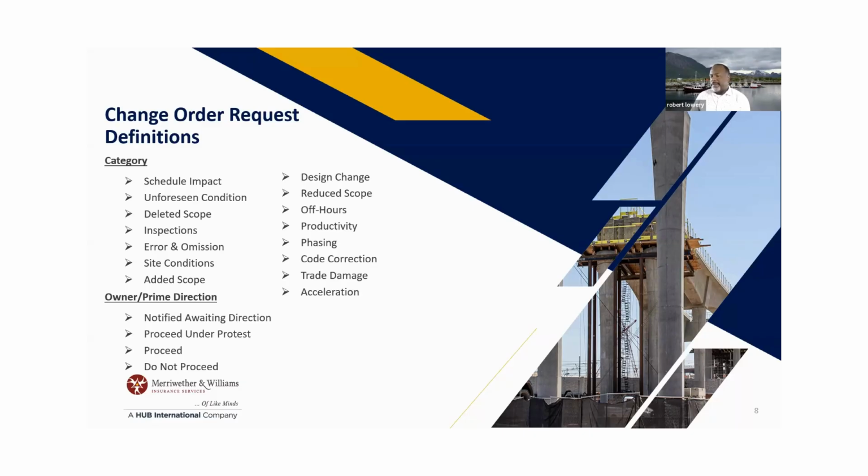Then they have 5 days, or whatever it says, to review and give those comments and approved shop drawing submittals back to you. At that point is when the clock starts to tick with your suppliers and manufacturers. Once they get the approved submittals and shop drawings from you, that's when their time starts, not before then, because they have not put it in production.